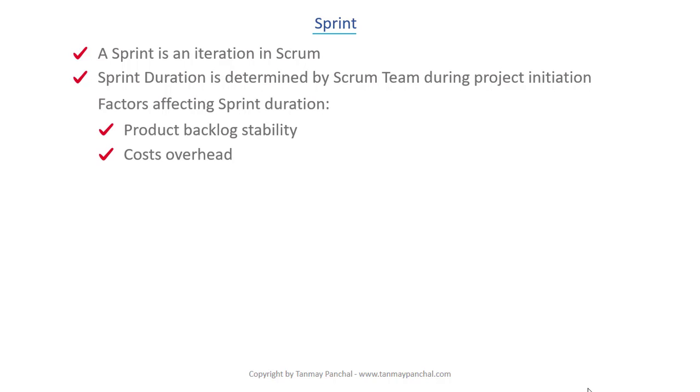For example, every sprint is going to have a sprint planning, sprint review, and sprint retrospective. If a team has been able to lower this overhead cost by automated testing, continuous integration, etc., this cost can be absorbed more easily, making shorter sprints more desirable. However, if this overhead cost remains high, the team may use longer duration sprints.